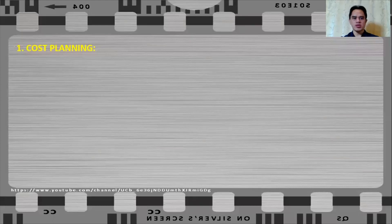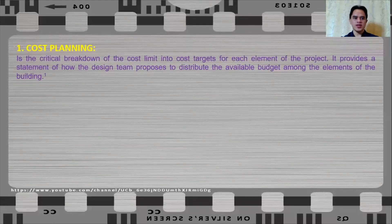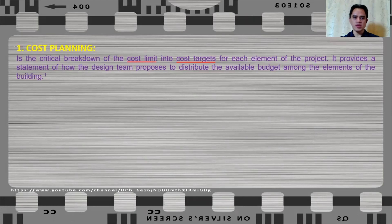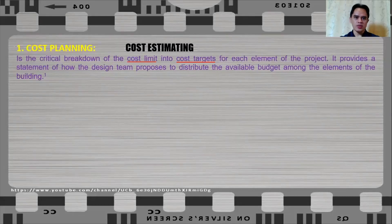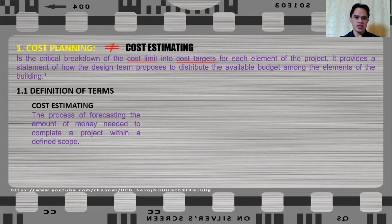Let us begin by defining what is cost planning. Cost planning is defined as the critical breakdown of cost limit into cost targets for each element of the project. It provides a statement on how the design team proposes to distribute the available budget among the elements of the building. We have to remember that cost estimating is not equal to cost planning, because cost estimating is the process of forecasting the amount of money needed to complete a project within a defined scope, while cost planning is the distribution of this estimated amount of money.